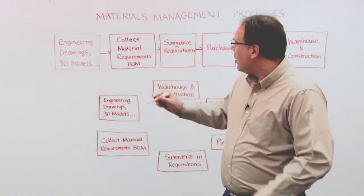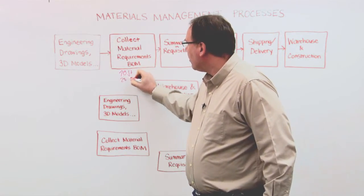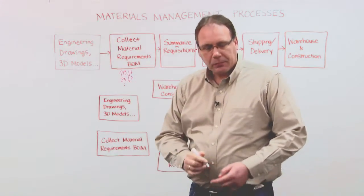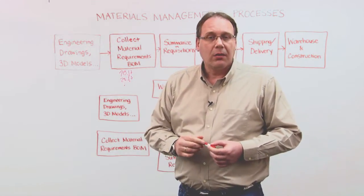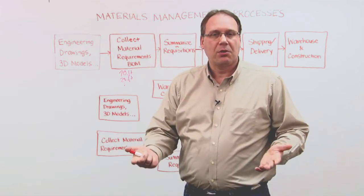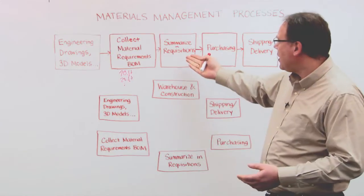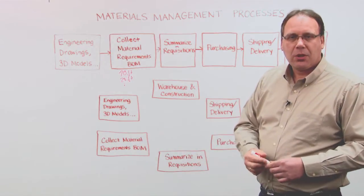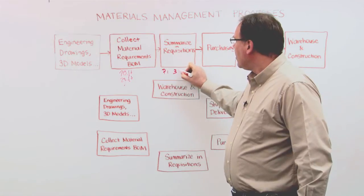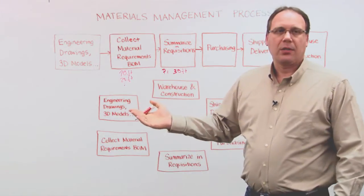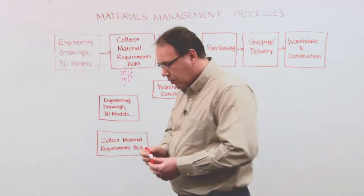So I can say I have here 10 feet of pipe and 20 feet of pipe and so on. Now you want to summarize all these material requirements into requisitions. So the next step is you summarize materials into requisitions and say I want to buy 30 feet of pipe. Pretty easy, pretty straightforward.